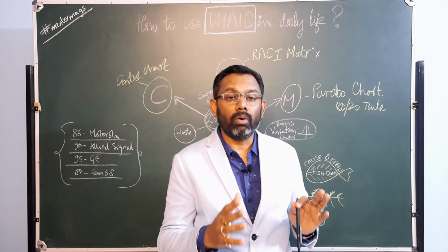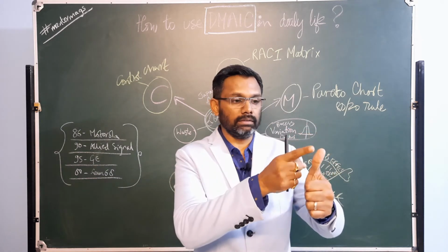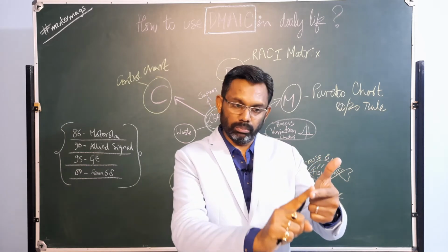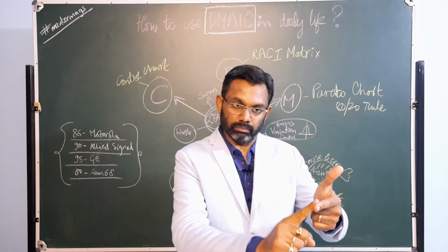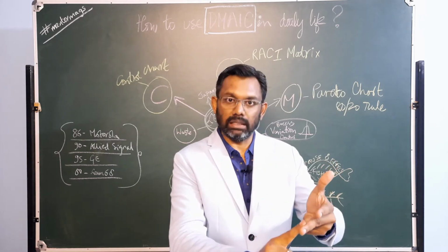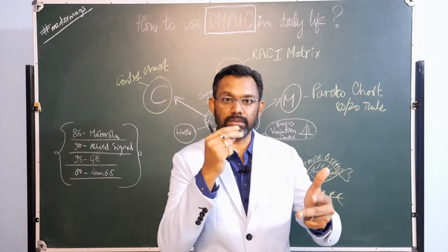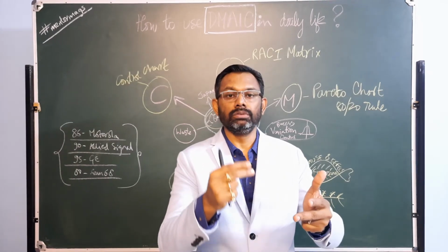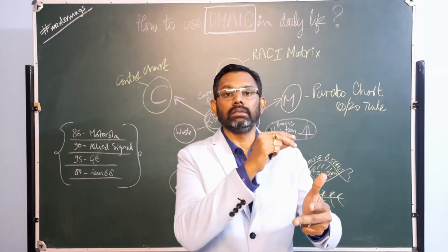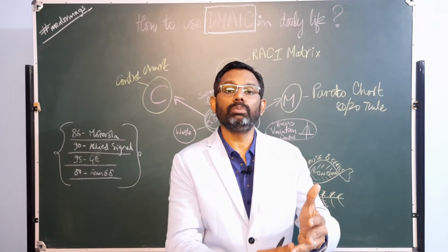It is important to define who is responsible for a task, who is accountable for a task, because it may not be the same person, who needs to be consulted in order to undertake the task. Maybe somebody has additional information in order to provide successful accomplishment of the task, and who needs to be informed.